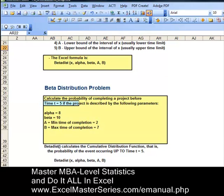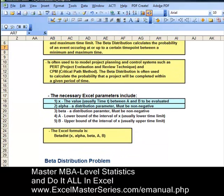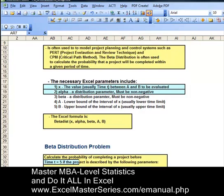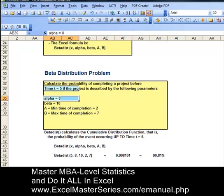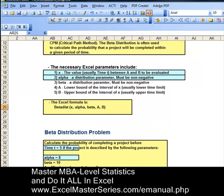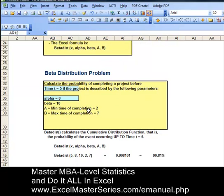It doesn't calculate the probability density function — that would be the probability of the event occurring exactly at t equals 5. Our second parameter is alpha; it must be non-negative, and we've set alpha to equal 8 in the problem. We can see below the numbers put into the formula. The third parameter is beta, which also must be non-negative, and we've set beta to equal 10 in the problem. Looking at the bottom of the page, we can see the beta distribution formula with the parameters put in there.